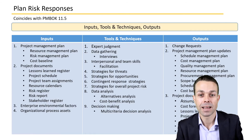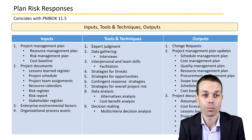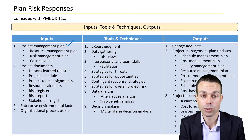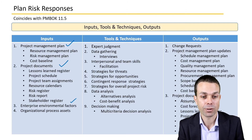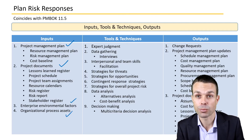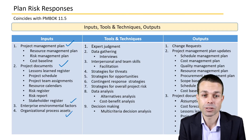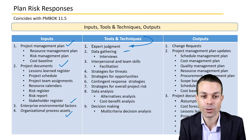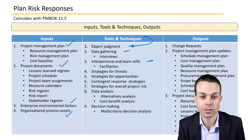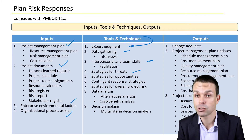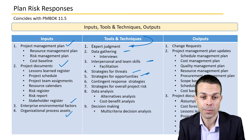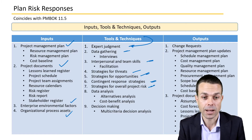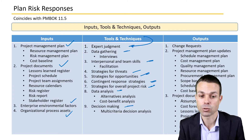The tools, techniques, outputs, and inputs for planning risk responses include: inputs of the project management plan, project documents, enterprise environmental factors, and organizational process assets. Tools and techniques include expert judgment, data gathering, interpersonal and team skills, strategies for threats, strategies for opportunities, contingent response strategies, strategies for overall project risk, data analysis, and decision making.